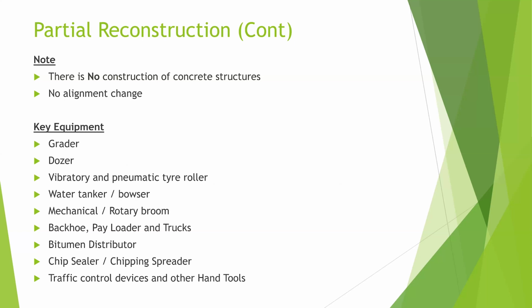So for partial reconstruction, you are not supposed to have construction of drainage works. In case you are to do drainage works, then the activity will no longer be called partial reconstruction. It will have a different terminology or a different activity.